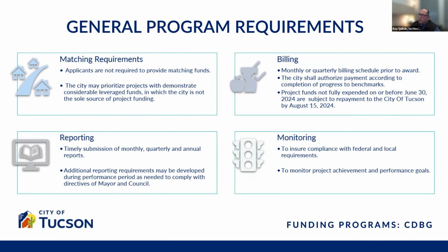Project funds not fully expended on or before June 30th, 2024 are subject to repayment to the City of Tucson by August 15th, 2024. With reporting, timely submission of monthly, quarterly, and annual reports is required, or we might require other reports during the performance period as needed to comply with directives from mayor and council. And with monitoring, the City of Tucson will monitor to ensure compliance with federal and local requirements, and will monitor your project for achievements and goals.